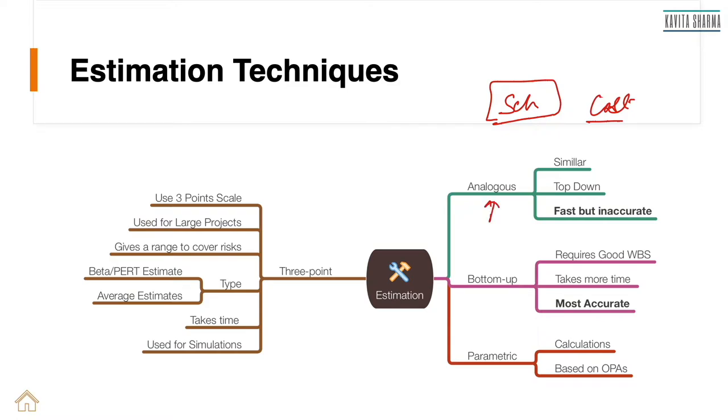Analogous are typically top-down estimates when I'm at the start of the project. Your sales guy comes and asks you how much time it's going to take for this particular project. You don't want to spend a lot of time looking at different components because you're not too sure whether the project is going to come to your organization or not. At that point of time, it makes sense to do analogous estimate.